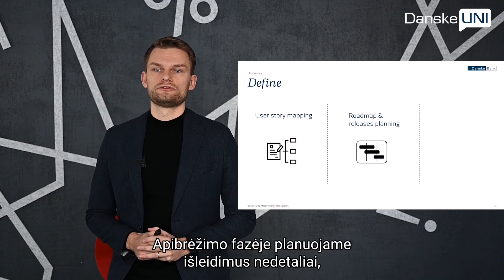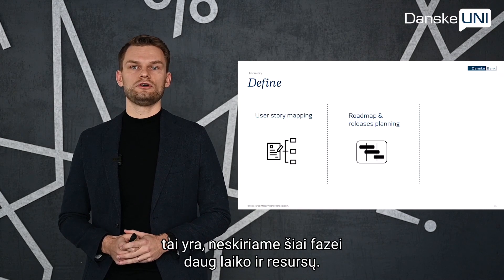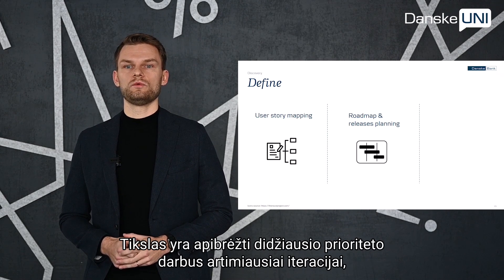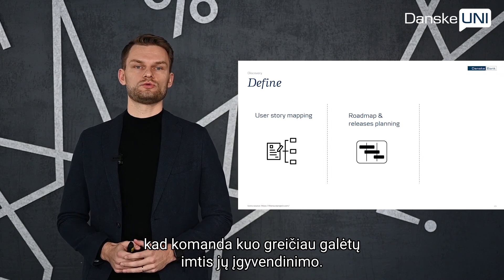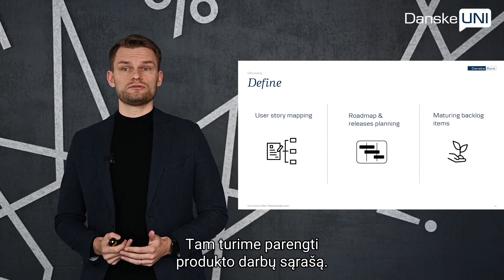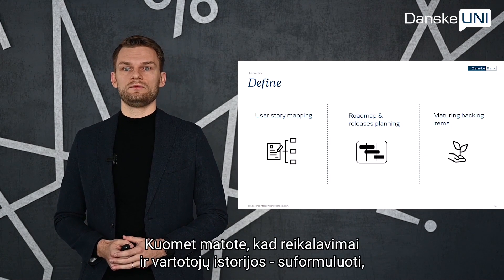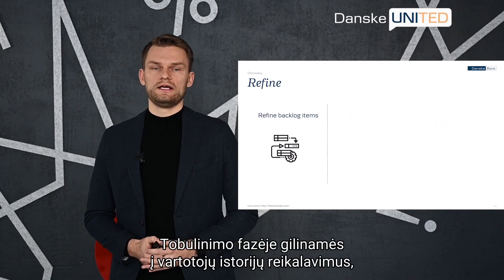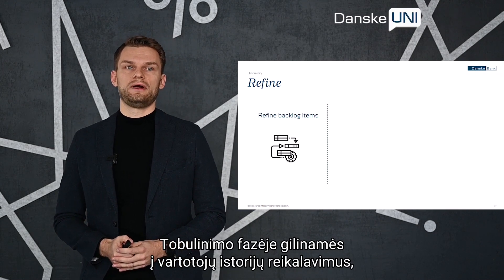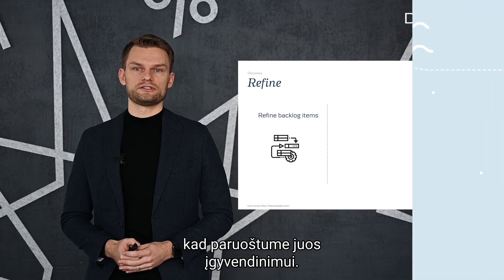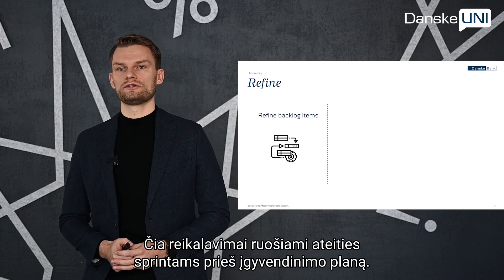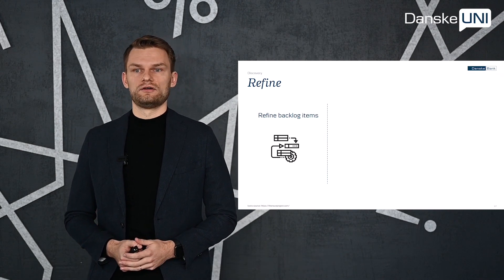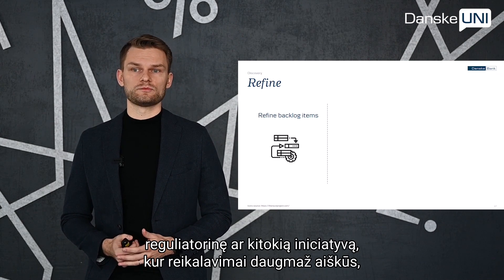During the define phase, we usually do roadmap and releases planning only on a high level, meaning we don't invest too much time and resources. Our goal is to define backlog items for the upcoming one or two iterations so that the team will be able to start development as soon as possible. In order to do so, we have to mature backlog items. When we feel that some user stories or tasks are quite matured, we have to refine them. In Scrum, we aim to prepare backlog items for the upcoming one to two sprints before iteration planning takes place.